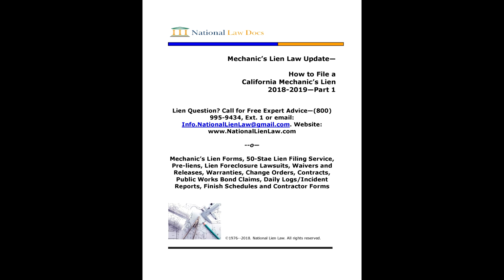The other $20,000 cannot be in the mechanics lien. However, when you bring a lien foreclosure lawsuit and add to it causes of action for breach of contract and unjust enrichment, you can add that $20,000. Include all amounts and do not discount for what the other side is alleging. So if you're a sub and have a $20,000 bill, but the general contractor claims you're only owed $15,000, it's what you think, not what they think. Add everything you think you're owed.